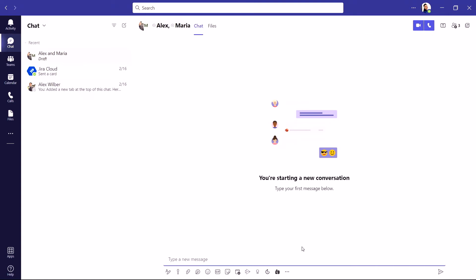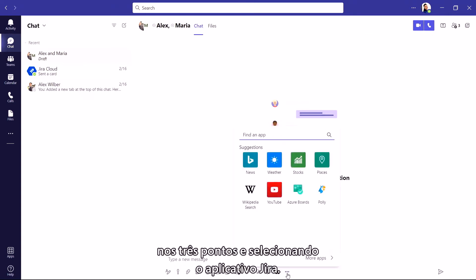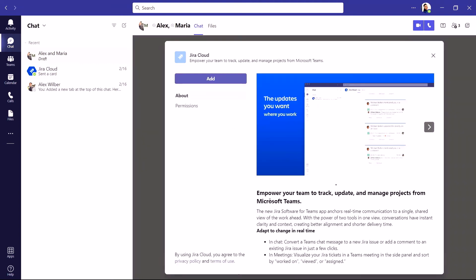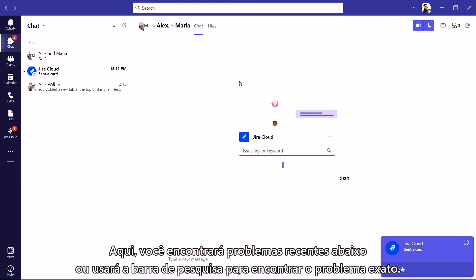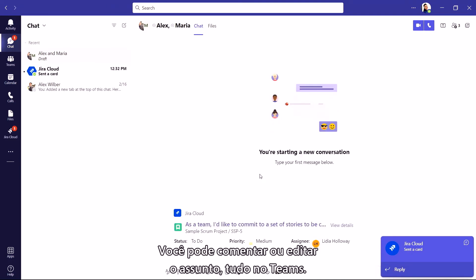To edit an issue or ticket directly from your chat, start by clicking on the three dots and selecting the Jira app. From here, you'll find recent issues below, or use the search bar to find the exact issue. Now you can comment or edit the issue all within Teams.